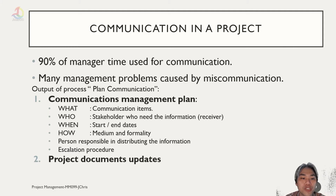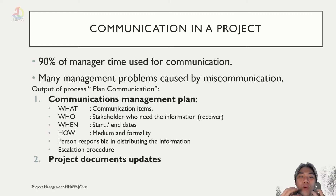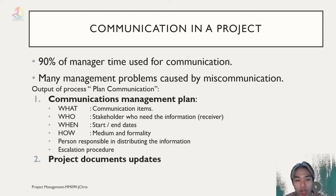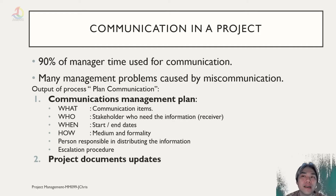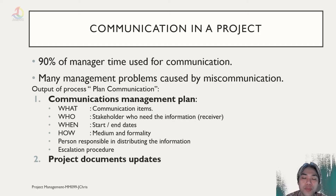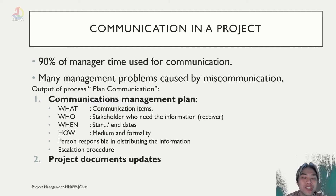In the communication management plan we have to know: what, who, when, and how. 'What' is the communicated items — the things that need to be communicated. 'Who' is the stakeholder that needs the information or gives the information. 'When' is when the information will be needed or taken. 'How' is how the communication is done — what medium, what formality, and who is the person responsible for distributing the information.